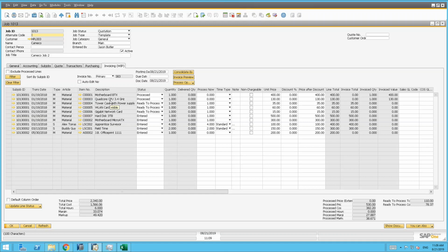billing. So what do I mean by contract-based billing? I mean, anytime you enter into a job estimate with a customer or a job bid, and maybe what you're billing to a customer is not exactly the costs that are being tracked here. So it may be a fixed bid contract. You may have gone ahead and estimated everything that you're potentially going to be costing on a job and said, okay, I think the fixed bid is worth $250,000 or $500,000.